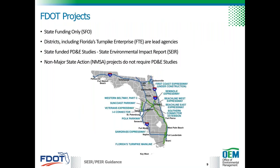For FDOT projects with state funding only, the districts — including Florida's Turnpike Enterprise — are the lead agencies. SEERs may have moderate to substantial environmental impacts and require a PD&E study. Those non-major state action projects are prepared for projects with minimal environmental impacts and are prepared during design. Due to these minimal impacts, they don't require EST screening or a full PD&E study. Non-major state actions will be discussed in Lesson 2.